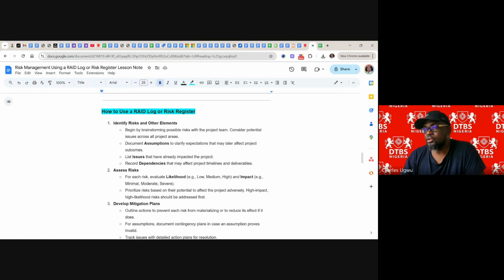In our organization, for something like the internet, we have what we call a proxy server as proactive risk management. Nobody uses that proxy server, but it's always there. We maintain it all the time. At times they even give it more attention than the main internet source.